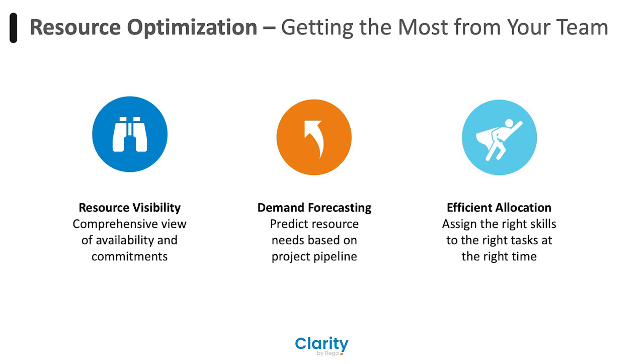She's a developer. In addition to those primary roles or roles that you're capturing, it doesn't always have to be tied to a main resource. Maybe I want to show future demand that I don't really have a named resource for yet. I know that in 6 months, I'm going to need 6 more developers. I don't have those resources yet. So either we're going to have to do contractors or we're going to have to hire more people. So that's another layer of adapting to the role perspective.